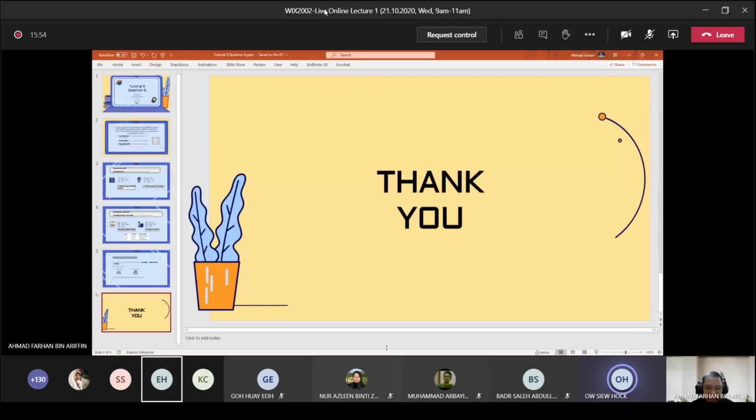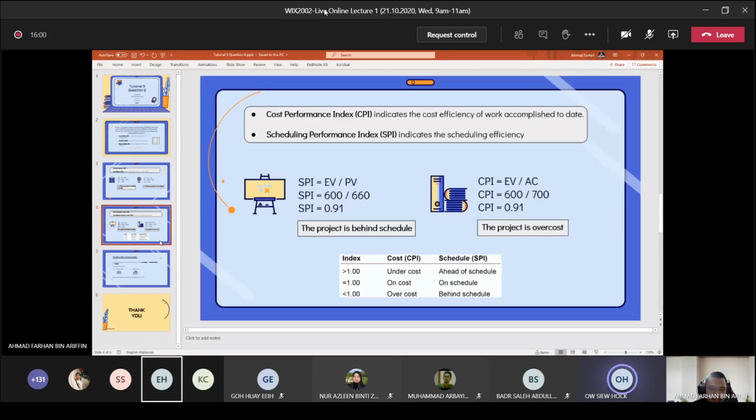When you explain the SPI and CPI, you should explain it this way. For SPI, the schedule performance index indicates that Ringgit Malaysia 0.952 worth of work has been accomplished for each Ringgit Malaysia 1 worth of scheduled work today. Until today, that means you only get back 0.952 ringgit worth of work completed. Then for CPI, the CPI of 0.857, or 0.86, shows that only Ringgit Malaysia 0.86 worth of work planned to date has been completed for each 1 ringgit actually spent.